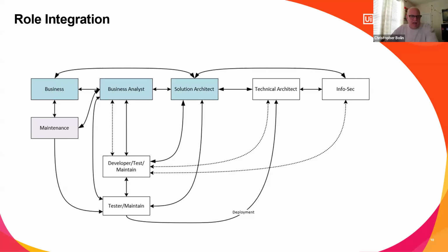And you ask me, and I'm sure you're wondering, or some people may be wondering, why don't we have our developers do that? Well, your developers have gone on and they've started building other automations, because if you want, let me back up and let's say in a typical CoE, you want an 85%, 15% ratio, 85% build, 15% maintenance. And if you have a good CoE with good developers, your goal should be a 90% build and a 10% maintenance. We're going to always have maintenance.